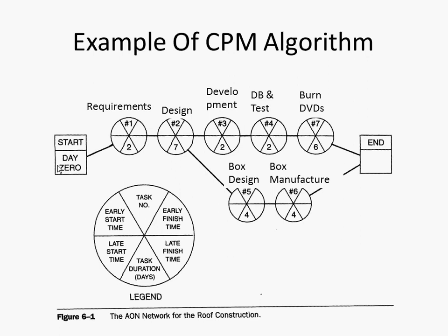9, good. Okay, this guy here, what's the earliest time we could start him? Yeah, he only depends on this one, right? Don't be fooled by the split here. He only depends on this one here, right? What's the earliest time it could finish? 11? 11 days? Yeah. What's the earliest time this could start? 11, finish. 13, start. 13, finish. 19. Okay, great. And now let's go this lower path here.